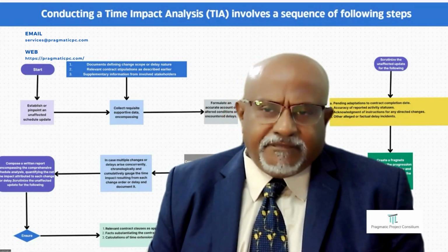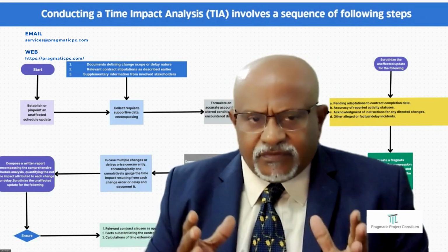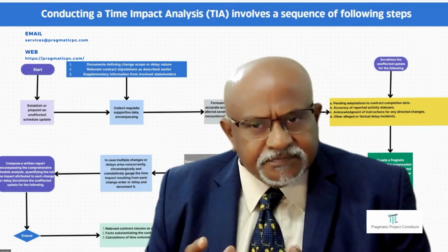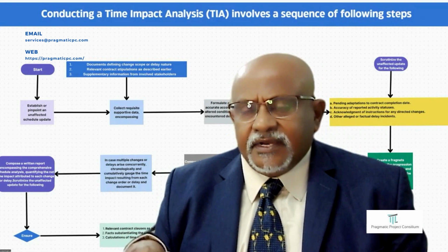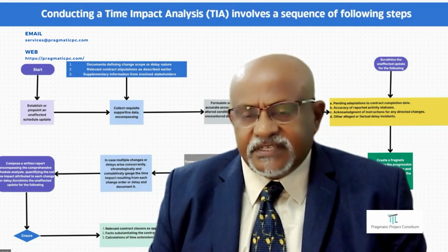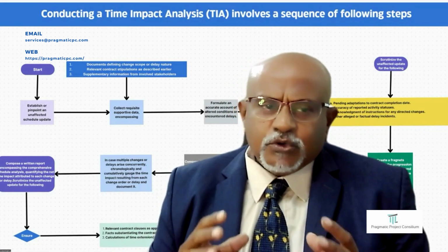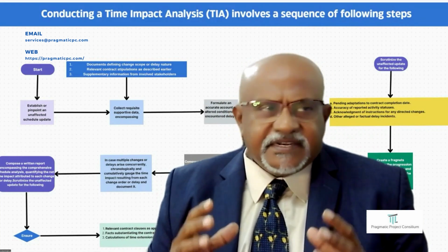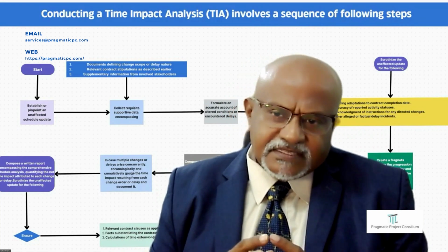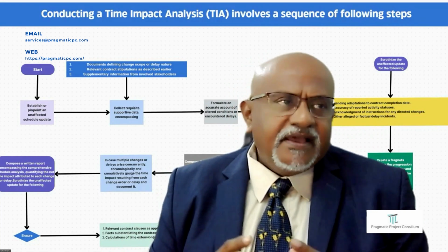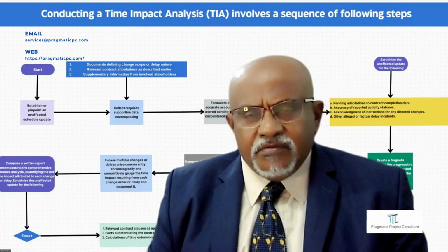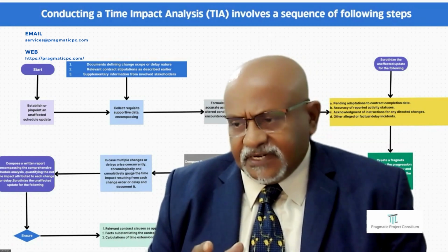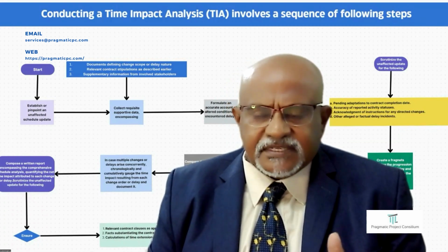Of course, a fragment represents a sequence of new activities and modified activities proposed for addition to the existing schedule. It means the changes are happening and we are going to accommodate the changes into the schedule. When executed correctly, this analysis guarantees that the depicted impacts of the delay did indeed elongate the project timeline. Furthermore, it can uncover concurrent delays if present. Concurrency by both the client as well as the contractor.